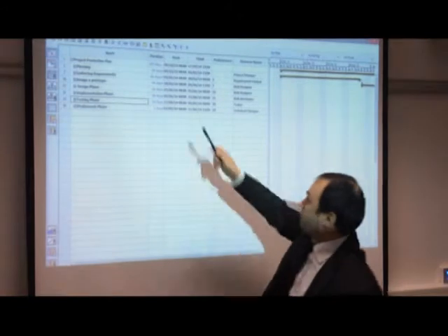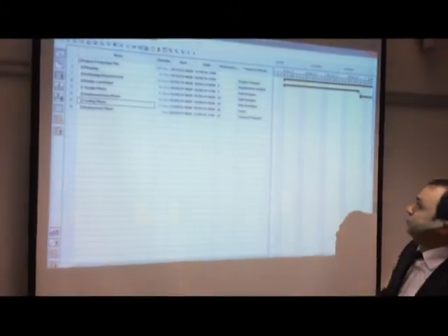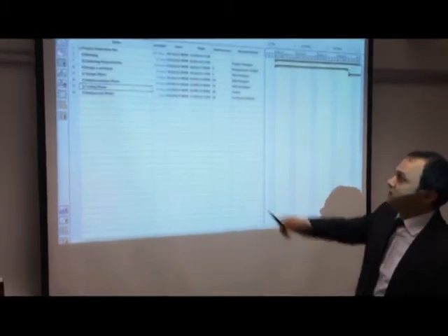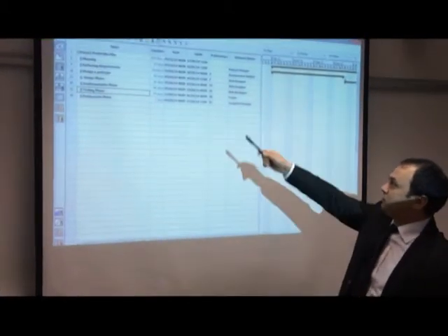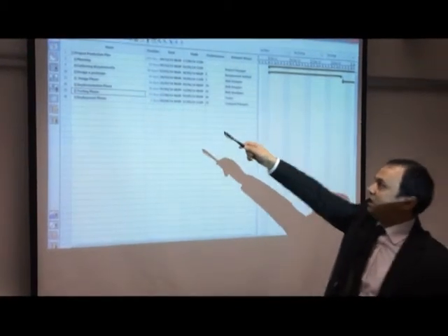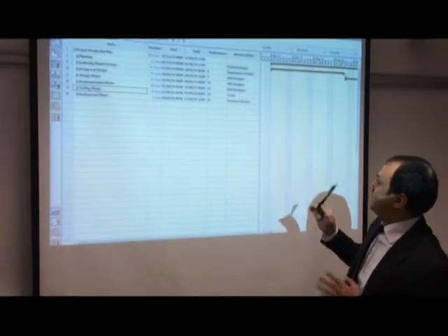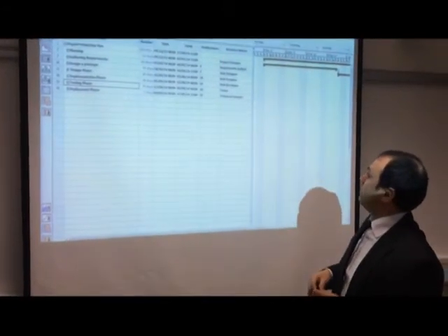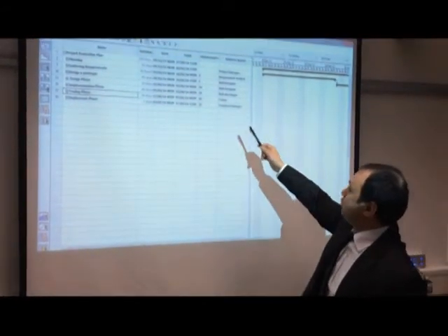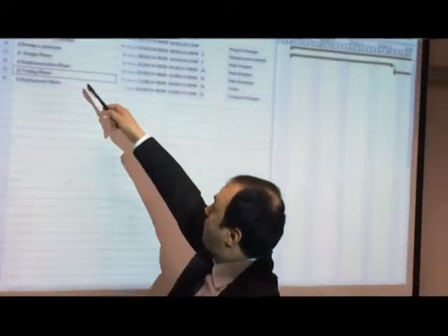The planning phase lasts for 19 days and is assigned to the project manager. Gathering requirements takes 40 days, and the requirement analyst is going to do it. Design prototype lasts for 40 days, and it's allocated to the web designer. The web designer will also do the design phase, which will last for 29 days.